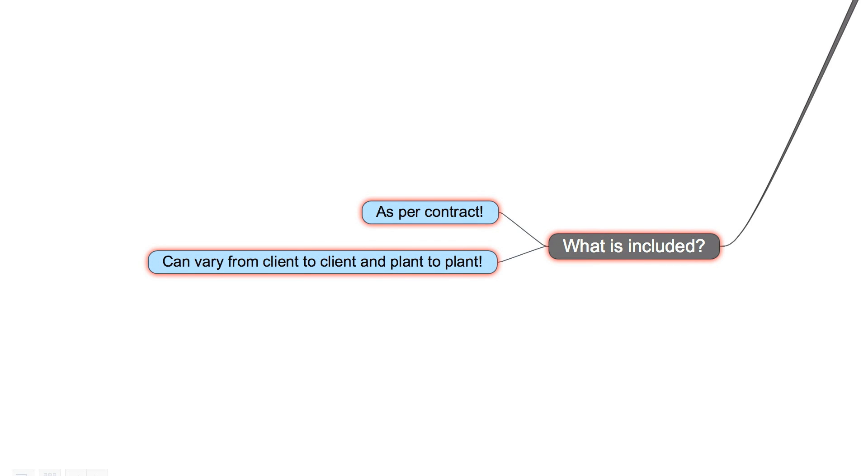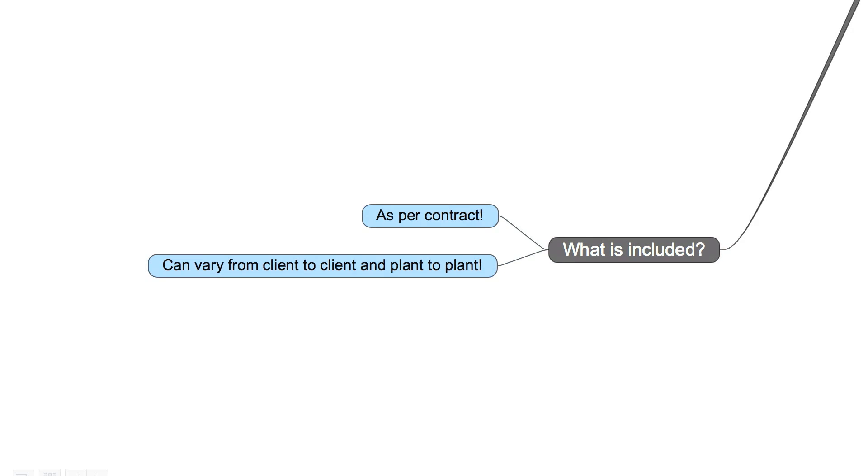So, now the big question: what is included into mechanical completion? The only right answer is it's defined in the contract. And this can vary from client to client and from plant to plant. So if you are not sure which activities are really included into mechanical completion, take the contract, read it, read it again, understand it and then you are really sure what is included. I will give you two examples.